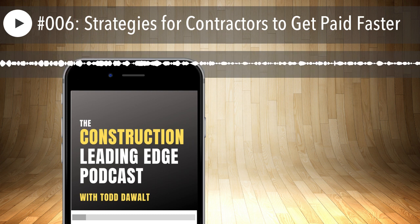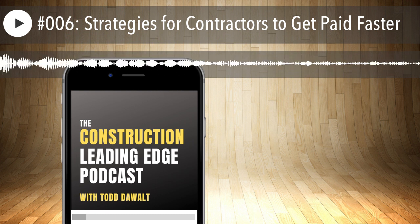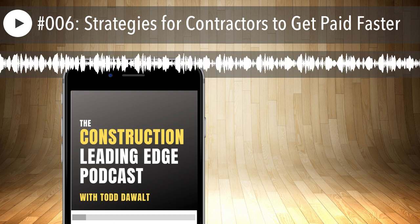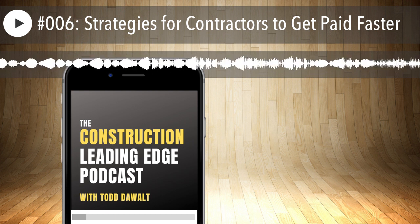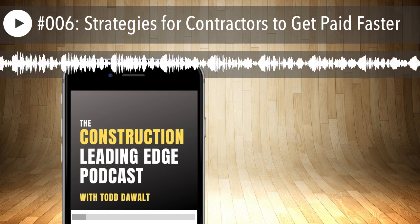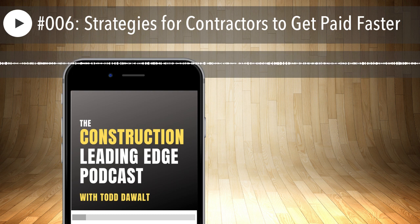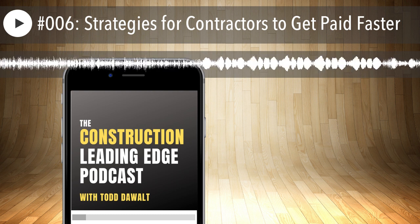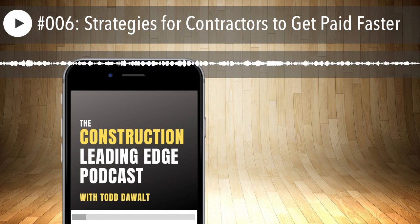Step number 4 is establish the sequence of approvals that needs to be followed. Chances are all these players that will affect your ability to get paid have not gone through this process, and I guarantee that none of them are as interested as you are in getting you paid promptly. So, establish the sequence of approvals that needs to be followed. Here's what a sequence could look like.